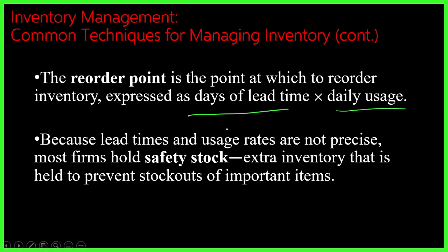So, for example, for those who do online purchases, if you try to purchase and check out an item, normally it will be indicated there. It will be delivered in 2 days, no? 2 days from the date of purchase. So that is now your lead time. Sometimes you will be given a range. Okay, it will be delivered in 14 to 21 days. That means that the normal lead time is 14 days and the maximum lead time is 21 days.